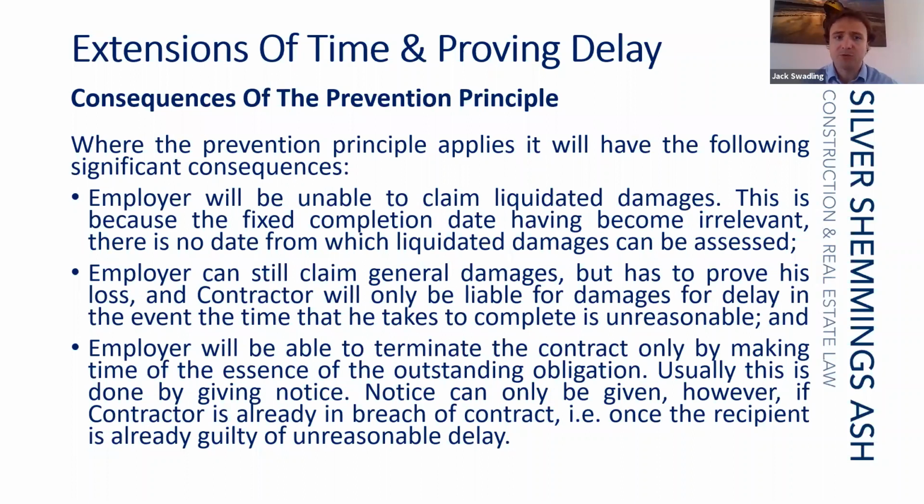So, as mentioned before, consequences of the prevention principle. Where the prevention principle applies, it will have the following significant consequences. The employer will be unable to claim liquidated damages because the fixed completion date having become irrelevant. There would be no date from which liquidated damages can be assessed.